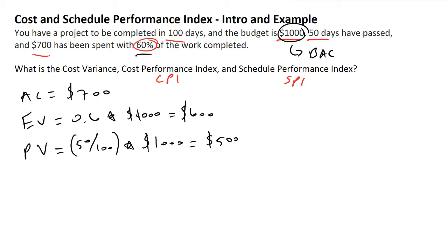Now we're going to focus on the term called cost variance. Cost variance, denoted as CV, is equal to the earned value minus the actual cost. So in our case, we've earned our company $600 in value by doing this project thus far, and we've spent $700 in their money doing that.